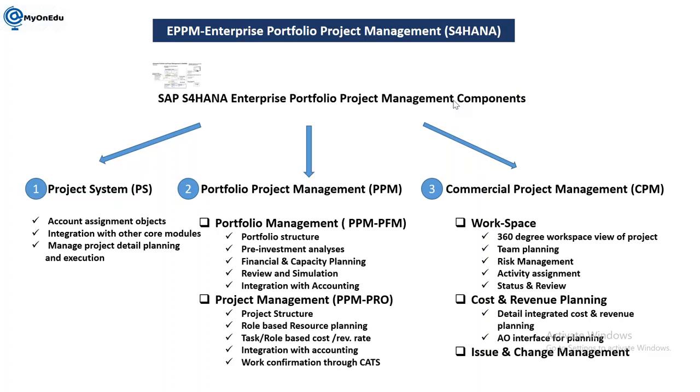Second, you need to understand the investment we are going to make in each option, and in how many years it will start giving a return. What is the success factor of this project, and what is the NPV, net present value, of the amount I am putting in? These different things combined are called pre-investment analysis. You can see this terminology in IM also. In IM we have a direct option of entering all these values, or automatic options to calculate these pre-investment analysis values. Whichever option suits you, you will go for that.